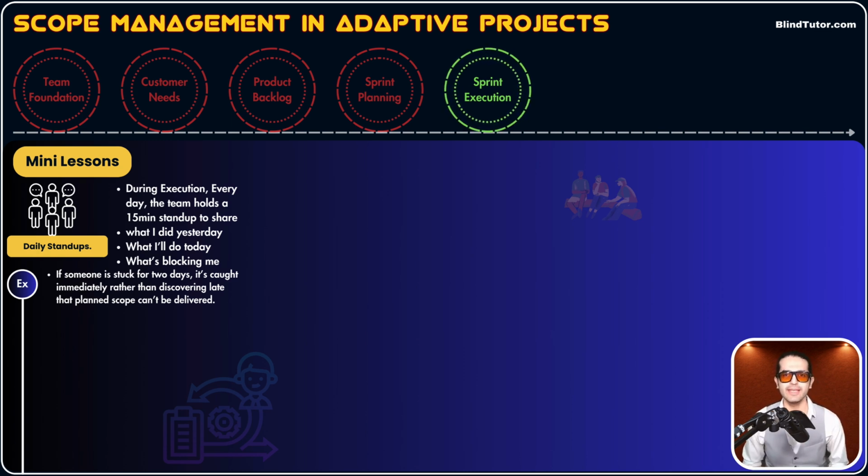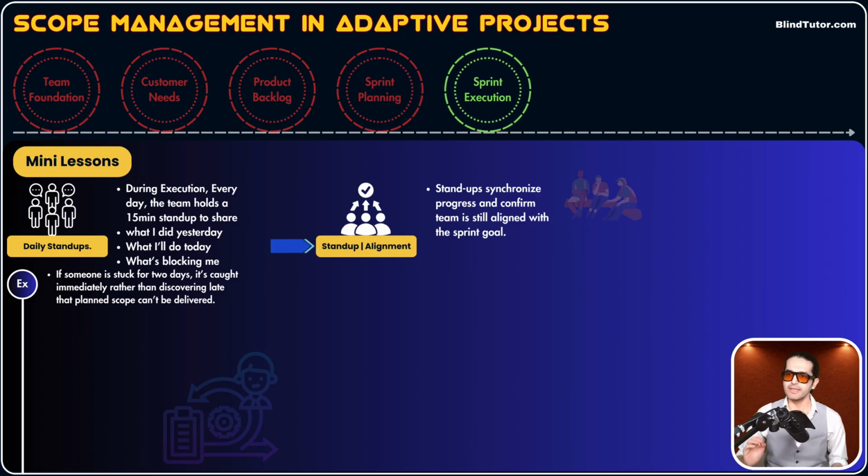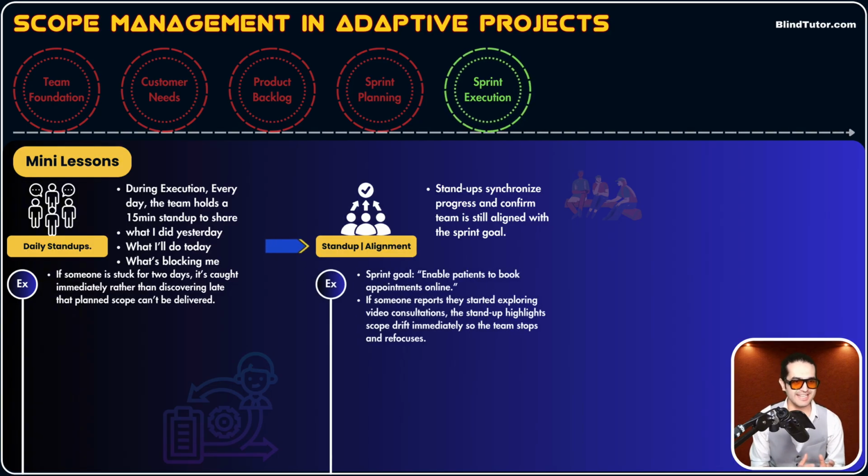The second benefit is alignment. Guys, if in those three statements a team member says that they are working on something that has nothing to do with the sprint goal, you cut it early. You may say, hey, this task that you're working on has nothing to do with the sprint goal. Do not work on that task. You coach and guide, guys. As a Scrum Master, your role is to know that everybody is aligned, and daily stand-ups help you catch those misalignments and then take corrective actions.